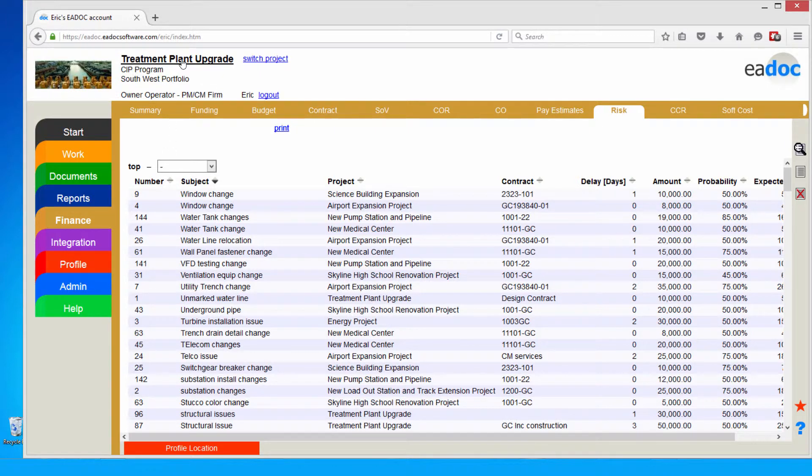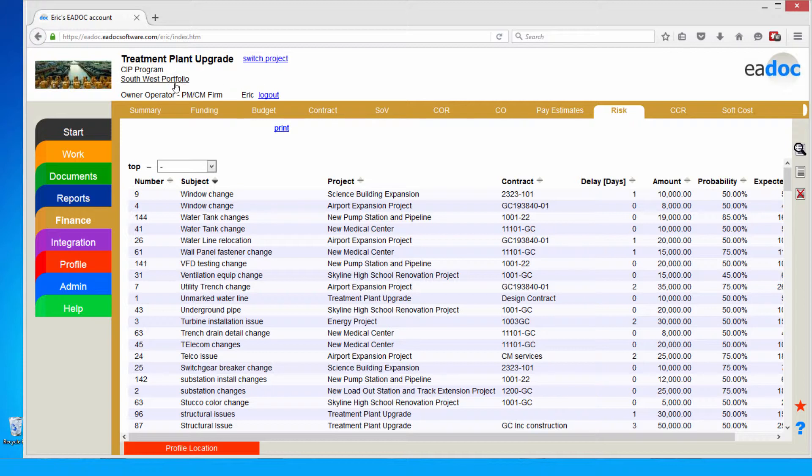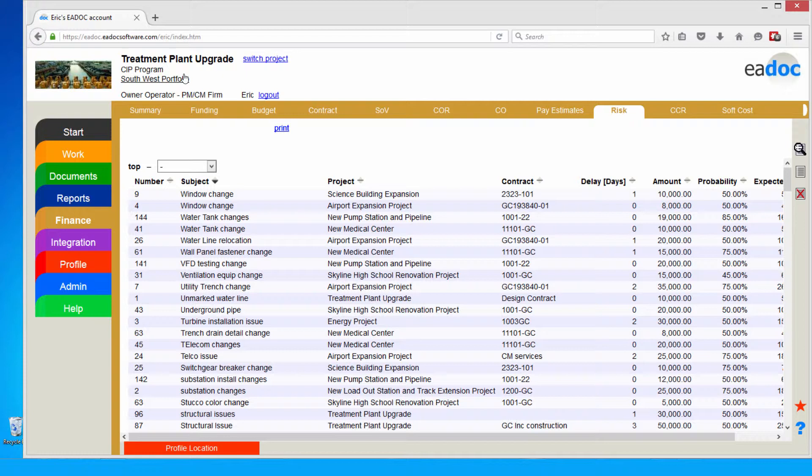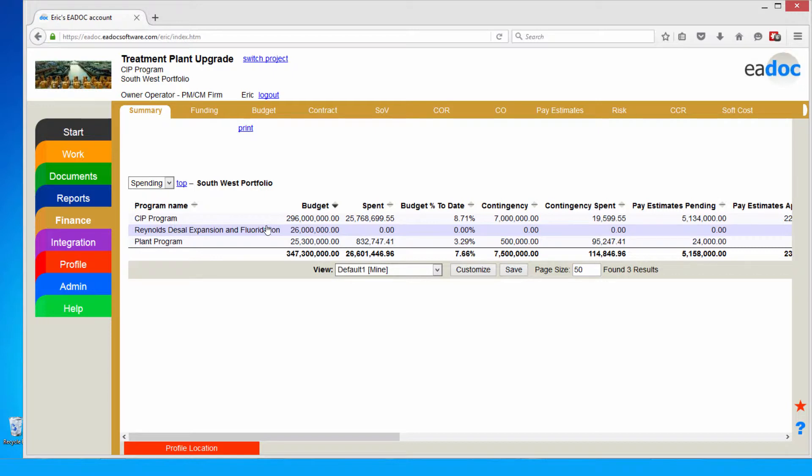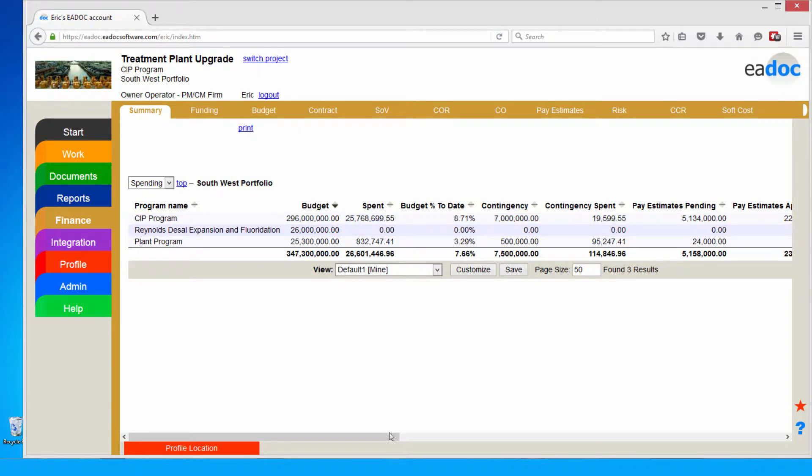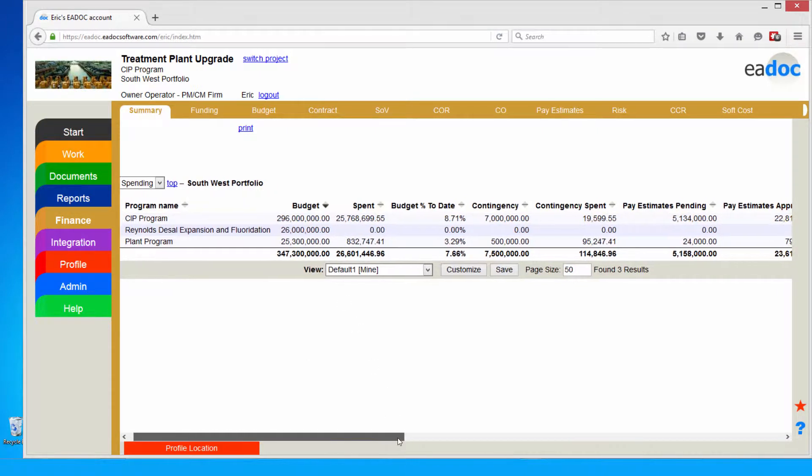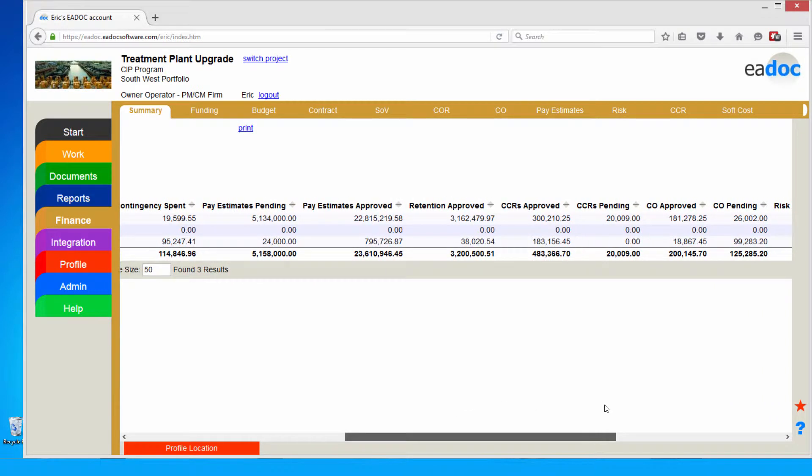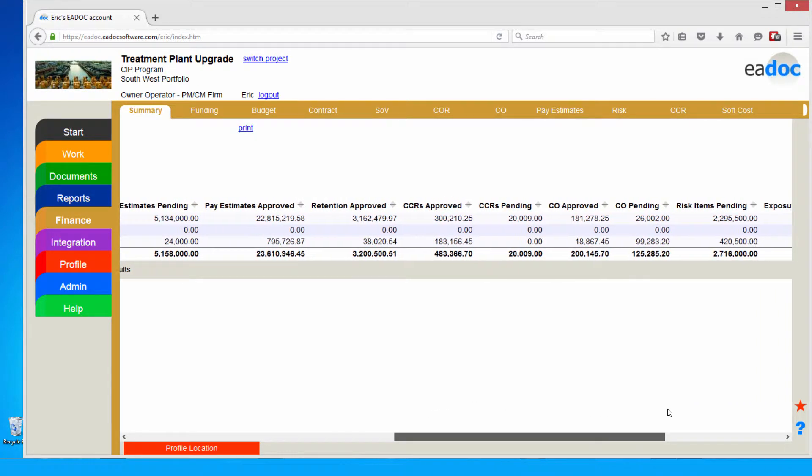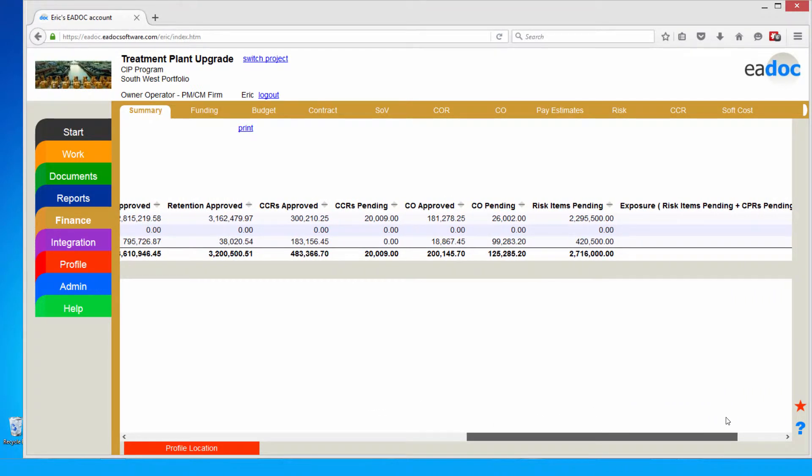Here in the top left, I'll see here's my treatment plan upgrade project. That rolls up in my CIP program to my Southwest water portfolio here. It's very easy to drill down and filter it. Keep in mind the user's permissions will control what they have access to. If I only have access to a project, all I'm going to see is project level data. Whereas if I'm a capital project manager or a program manager, I'm going to see all the projects within my programs and portfolios. As I mentioned earlier, this risk information rolls up into our financial summaries. I can take a look and I can forecast out potential cost impacts. I can put those against things like my budgets. I can put them against my contingency budget so I can have different types of budgets. Then my financial summaries, I can look at things like payment applications, pending, retention, improve, change requests, and change orders here in the system. There's my risk item. So it's a great way to forecast in this project.